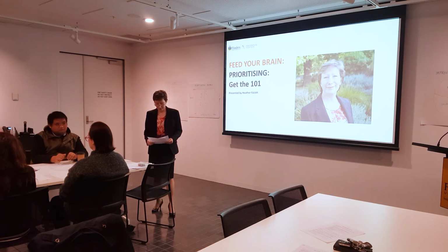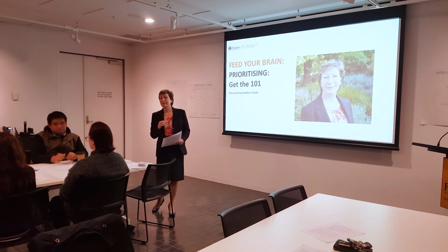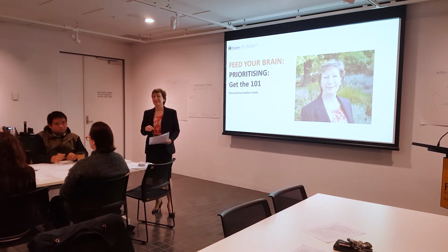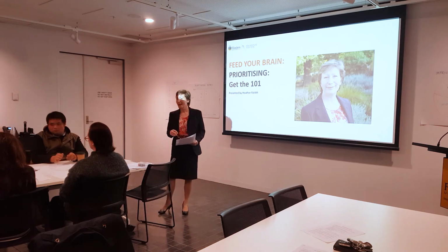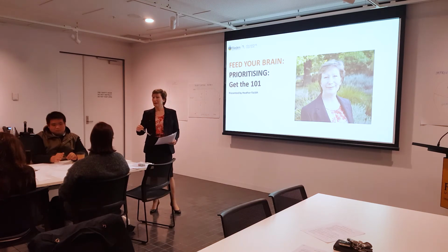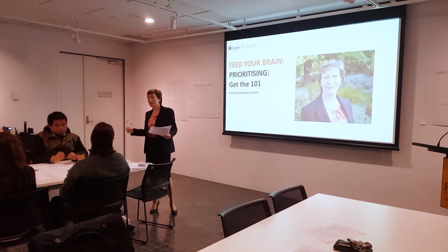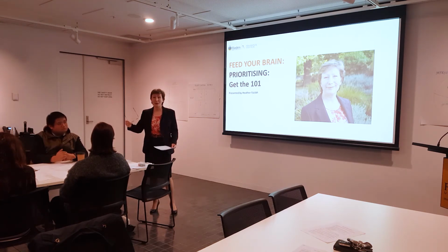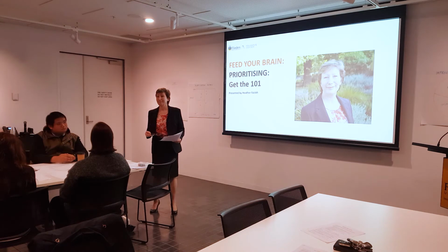So we're aiming strategically for the top right, but if they're spinning their wheels, reprioritise, whilst you get quick wins in the first few weeks and months, so they actually see progress. And especially that's for your management structure as well. So the point I like that Austin is making is this is not a static document. It is a document of your priorities at a point in time, but obviously things change day to day, week to week, month to month, and sometimes you have to go back and look at the priorities again and reprioritise based on new information. For sure.